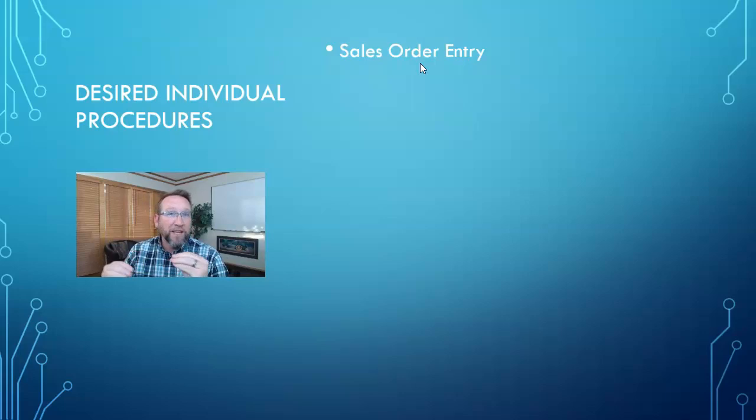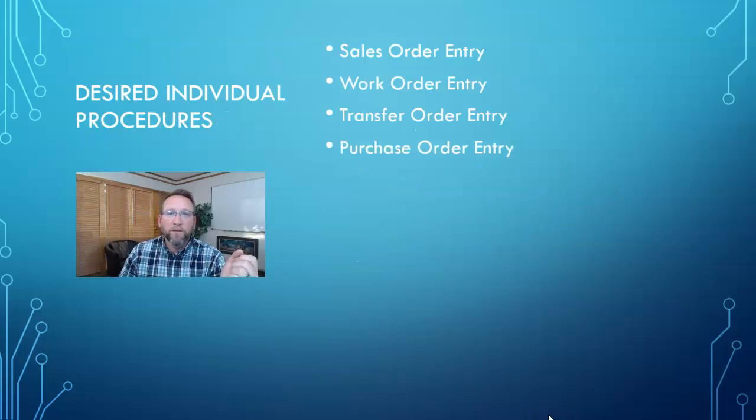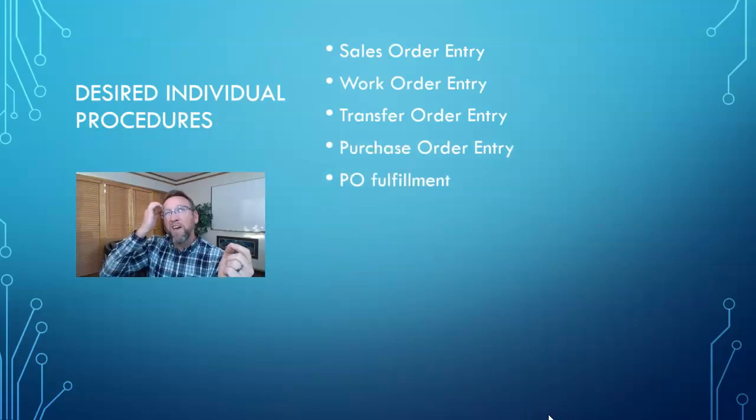And this is where we can adjust some of the setup we did. If we're uncertain about things like our bills of material setup or our product numbers, then back here on the setup sandbox step, we may want to set up just a small subset of data first, test it out, assure it's going to work, and then set up the rest of the data.